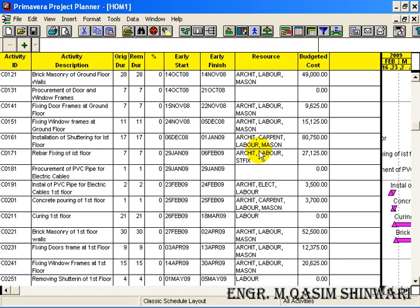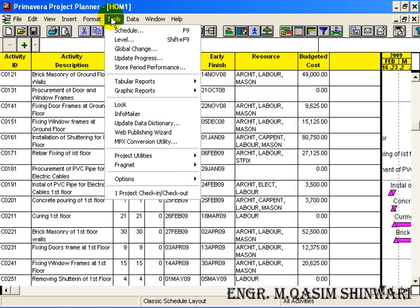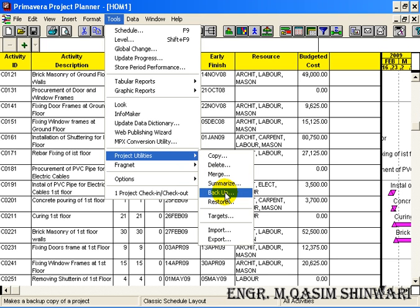It's my suggestion for you to create the backup of all the projects at the end of the day, so that if you mistakenly do something, you can regain your data. To make the backup, go to the Tools, Project Utilities, and here click on Backup.